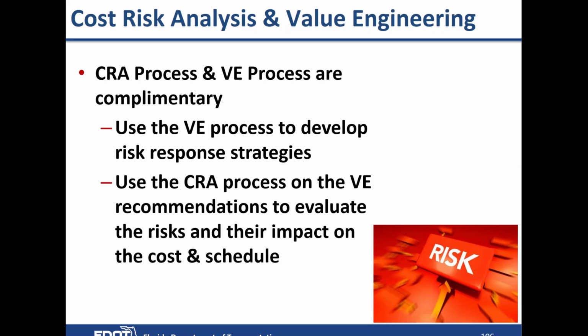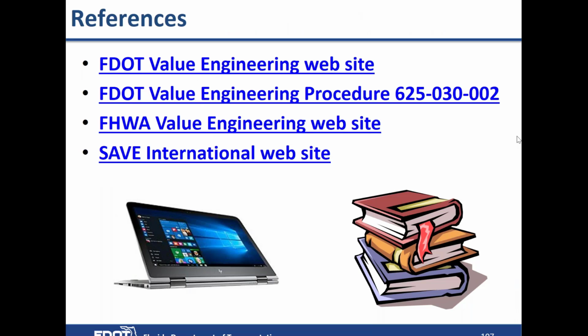And the CRA can be used on the VE recommendations to evaluate the risks that may be introduced with the VE recommendation and their impact on the cost and schedule. So they're complementary processes. The differences are that during a VE study, the project manager and the design team only participate at certain points, and during the risk workshop, they participate 100% of the time.